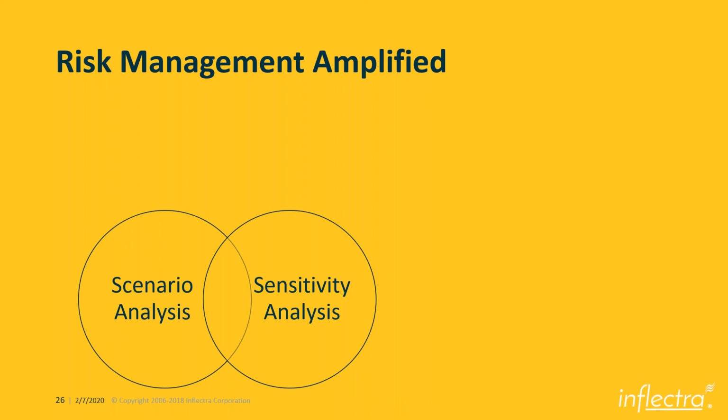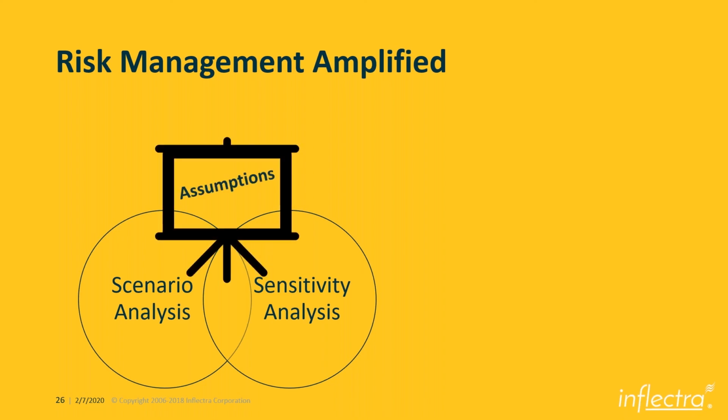Remember, qualitative risk management is really mandatory, whereas quantitative risk analysis becomes optional, even in project management terms. So scenario analysis is giving that, and sensitivity analysis is taking it a step further. Both of them are focused on one thing, validating the assumptions. It's all about the what-if analysis, or assumptions analysis, as people frequently call it.